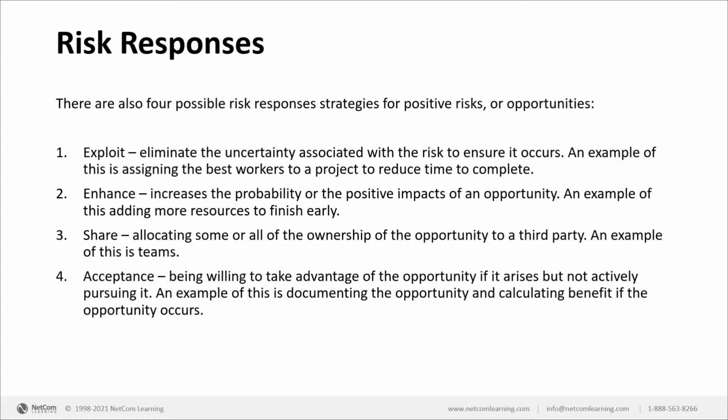And finally, accept. Just like the negative risk acceptance, what you're doing here is you're clearly saying that, yes, let's agree to the risk, but taking an action at this point in time may not be a very fruitful thing, because the action in itself is going to be much costlier than the risk itself or the benefit it's going to give. So you simply say, let's sit, let's see what happens. And if in future the risk is growing and we realize that, yes, the risk may give better returns, that's when we're going to go ahead and take actions.